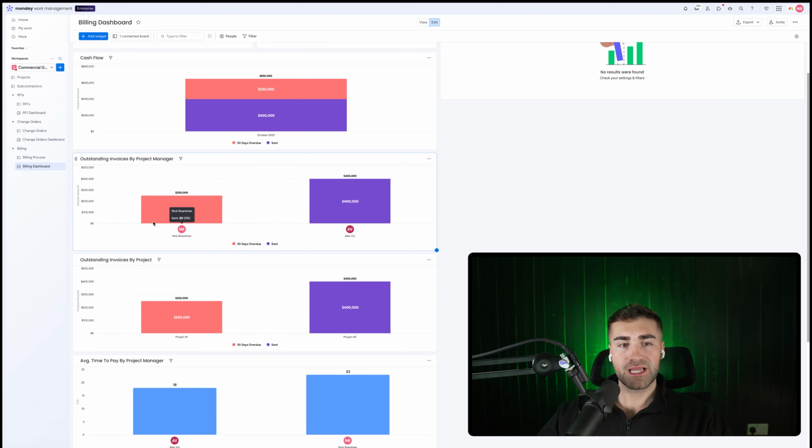We've then also got outstanding invoices by project manager. So if you have multiple project managers and they're responsible for managing multiple projects, you can see maybe there's a project manager that's not so good at making sure that invoices get paid, or there are issues with the project because of the project manager or for whatever reason. And let's say Alex, for example, has a significantly higher outstanding balance across all of his projects over myself, or the other way around. Or if someone has no outstanding invoices associated with any of their projects, that might be cause for concern as well.